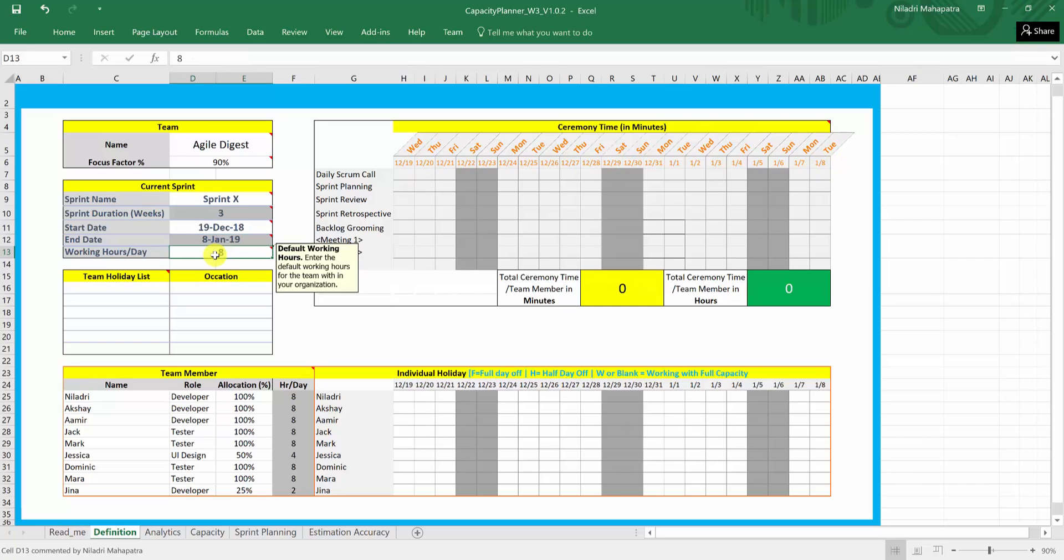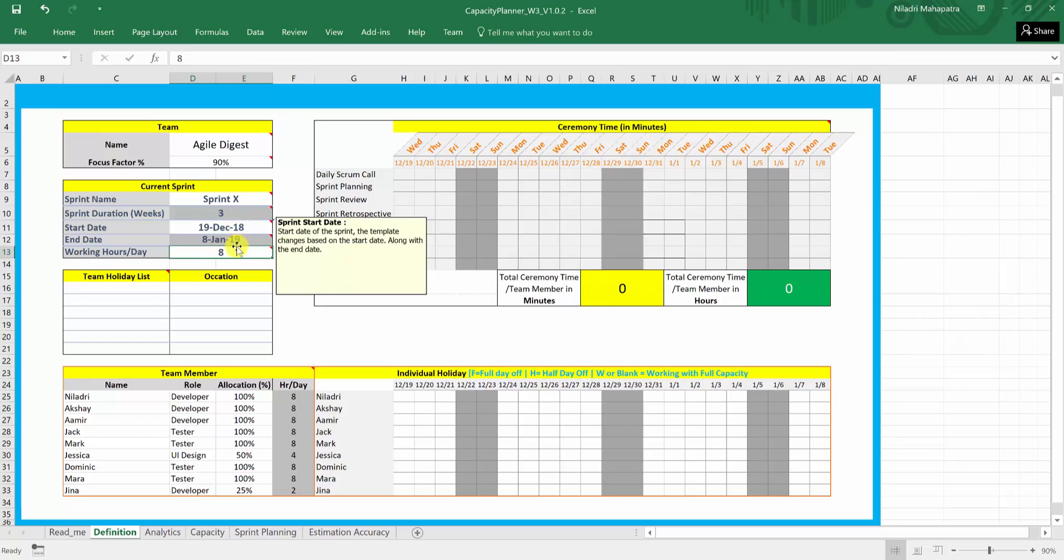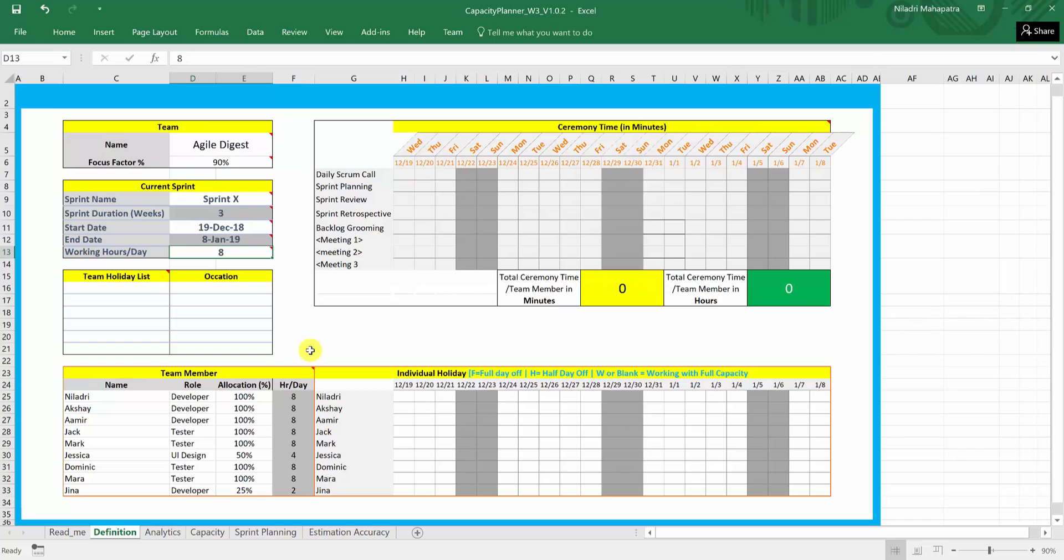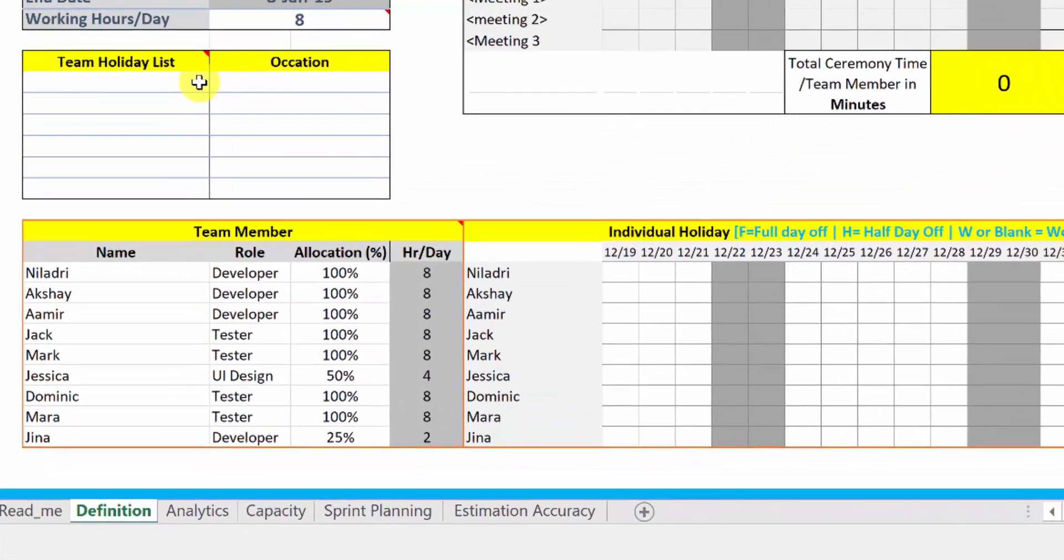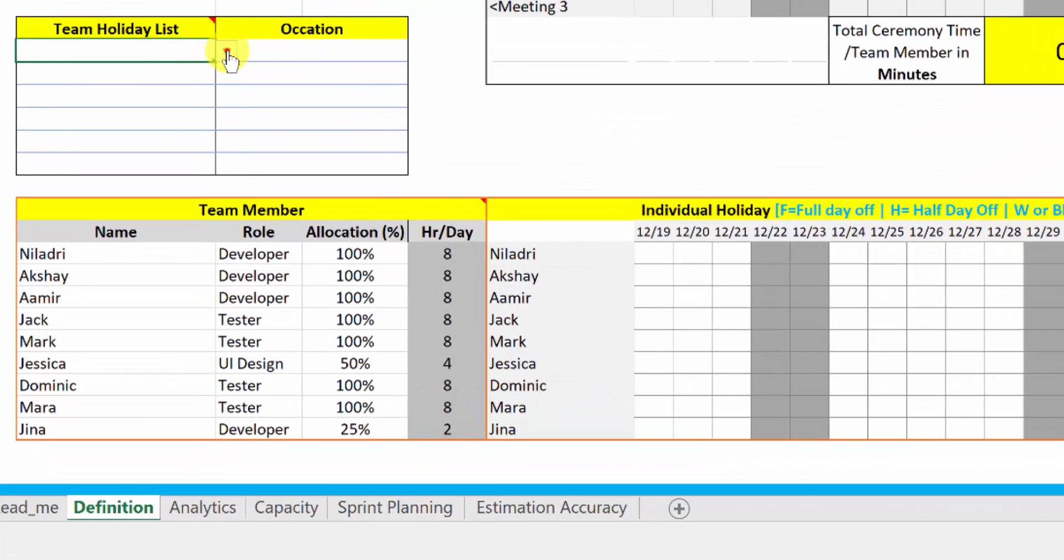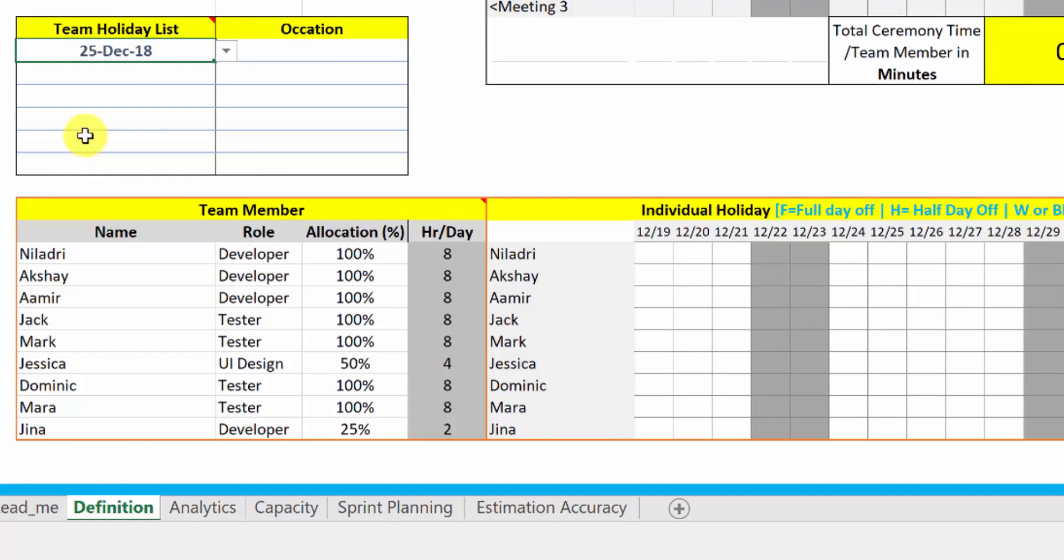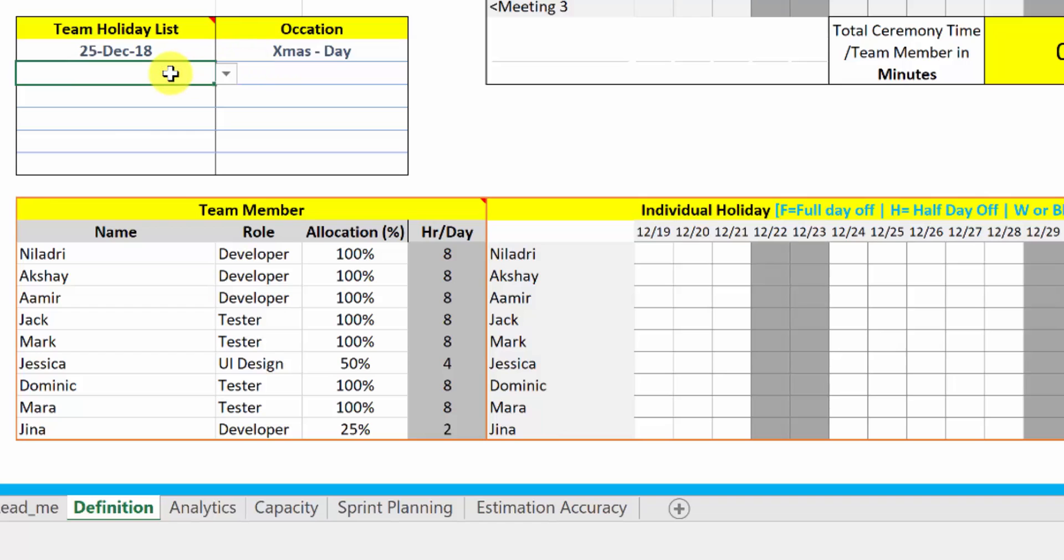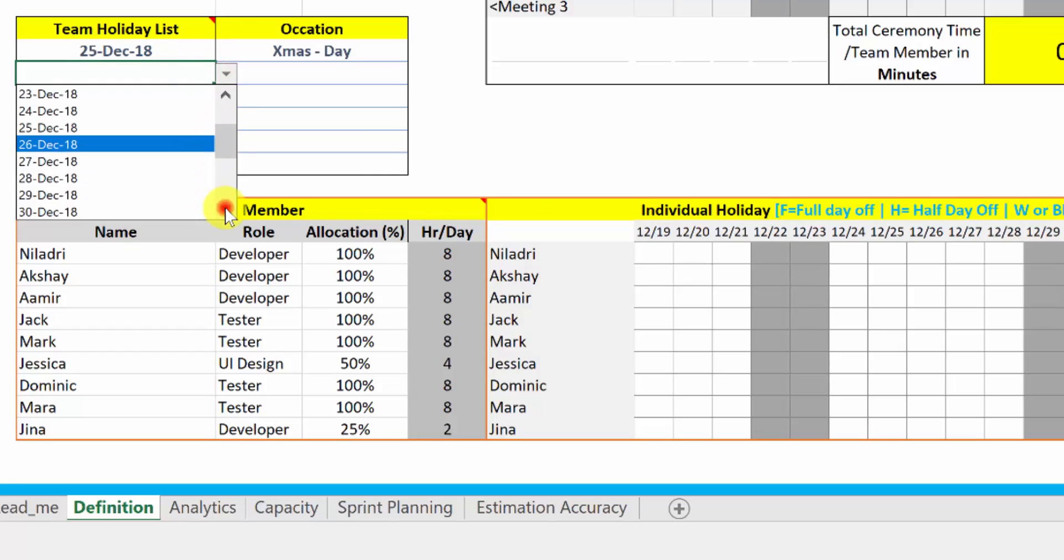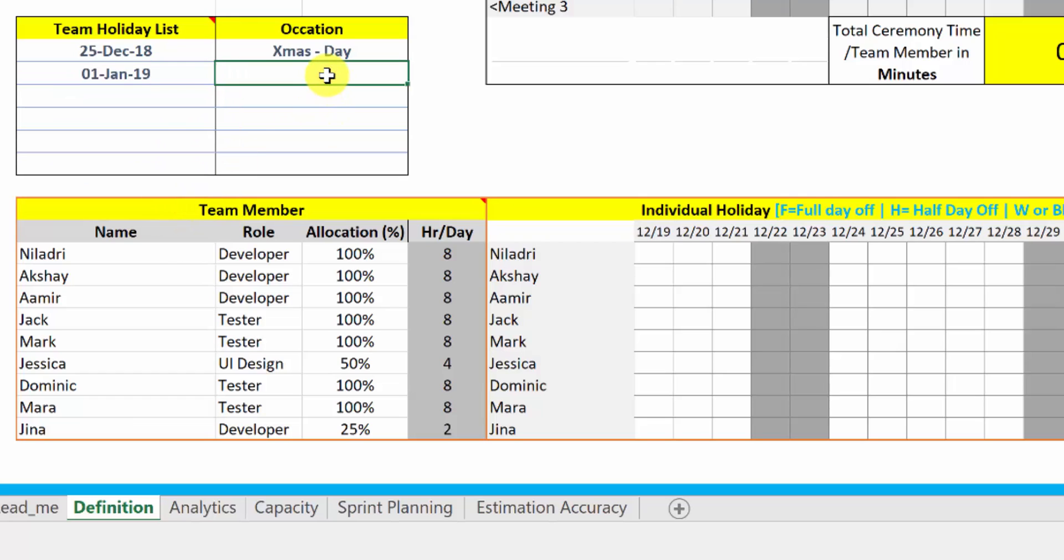Working hours, eight hours that we already talked about. Now, within this date range of your sprint, is there any company holiday or any off holiday that is applicable to the entire team? I guess yes. This 25th of December is Christmas day and many companies give 1st of Jan as a new year off also. So you can add all your company holidays here. So I will select 25th of December. So there is a dropdown. It will come only those dates only and you actually for reference you can give why it is off and secondly, I can add one more day that's 1st of Jan that I can actually select it from here and say new year.